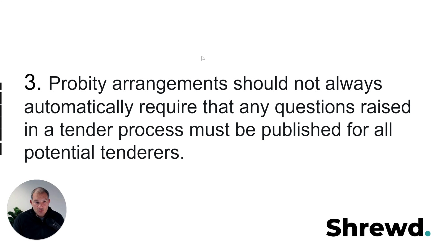Normally when you are running a tender, if a tenderer asks a question, usually you will sanitize that question so none of the other tenderers know who asked the question, and then you circulate the answer to that question to all other tenderers. Now that is what happens, say 90-95% of the time, but there are certain circumstances when a tenderer will ask a question that it may not be appropriate to circulate to all other potential tenderers. And that could be for security reasons or privacy reasons or something like that.